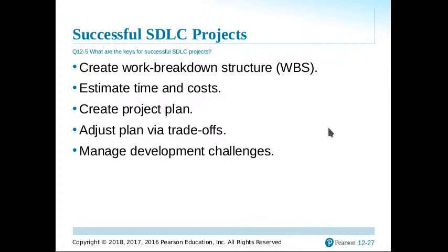All right, so that's about the software development lifecycle and how we use it in information system development. And remember that this approach was once very popular, but not these days, because looking at the way we do software with this, you can see it takes a lot of time, right? Because we go step by step, and each step may take a lot of work, and only until it is done do we move to the next step, and so on. The last step will be done only if we have all the previous steps done. And then it takes time to finish the system before using it.